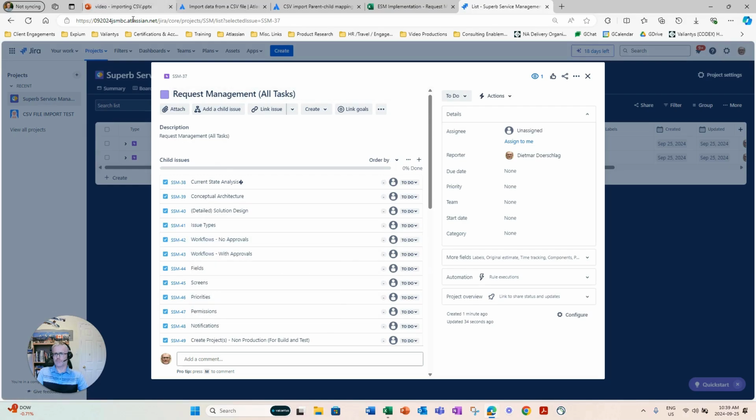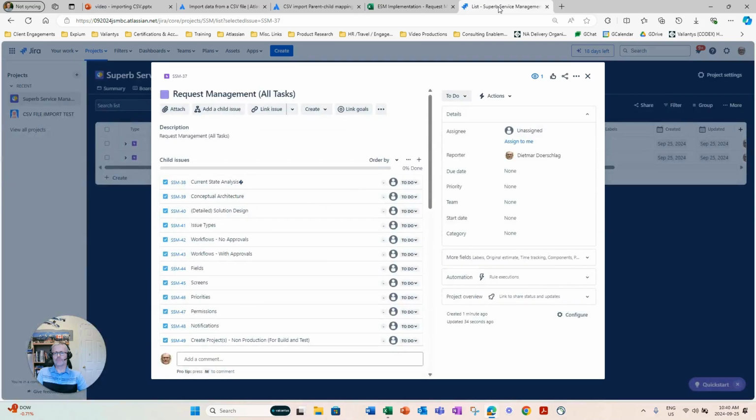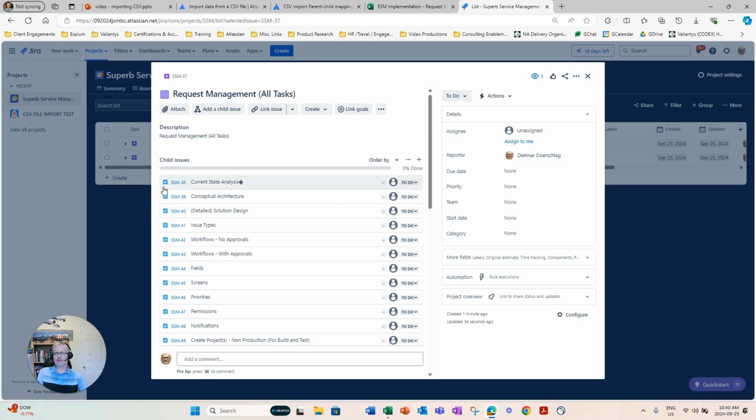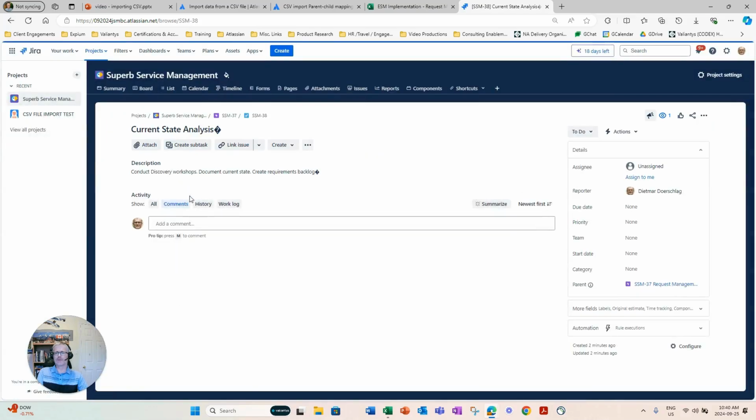What I demonstrated or mentioned earlier in the slide deck here is that the import file could also include 3 levels of hierarchy. It will also allow you to map from epic down to task and then down to subtask. In which case, if I had subtasks also created or included in that CSV file, the subtasks would now simply be shown mapped up to the task. So it works exactly as we had envisioned this.